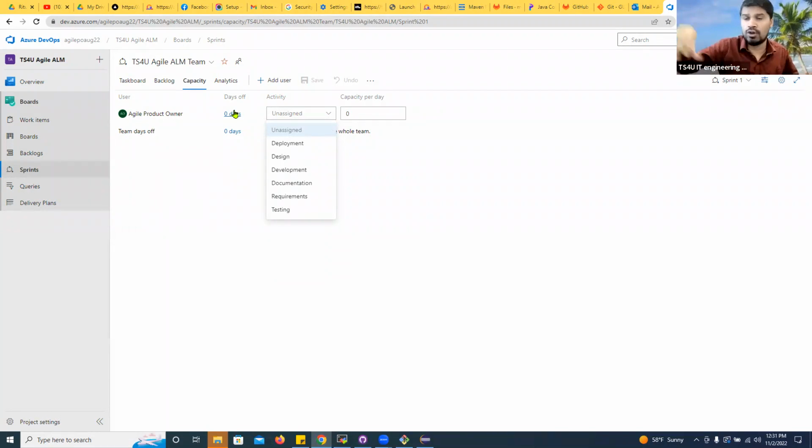As an example, you will be working in the 2 weeks sprint, you'll be working in 1 sprint, then you are leaving for Cancun for another sprint, right? For another week. You just put the 5 days. So you are 5 days off. Okay. And that's the individual team member day off. The second one is team days off. Christmas, Thanksgiving. So those, the whole team is off. It's like a regular holiday. Yes. Or the whole team is going to volunteer, right? Outside work. They're not working here. Those are the team days off.